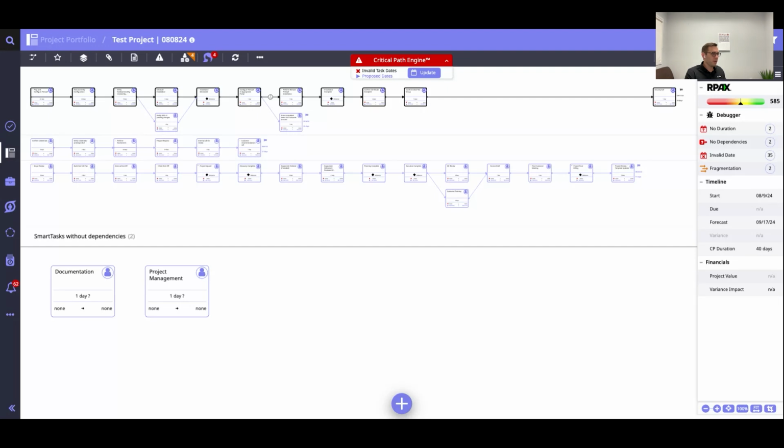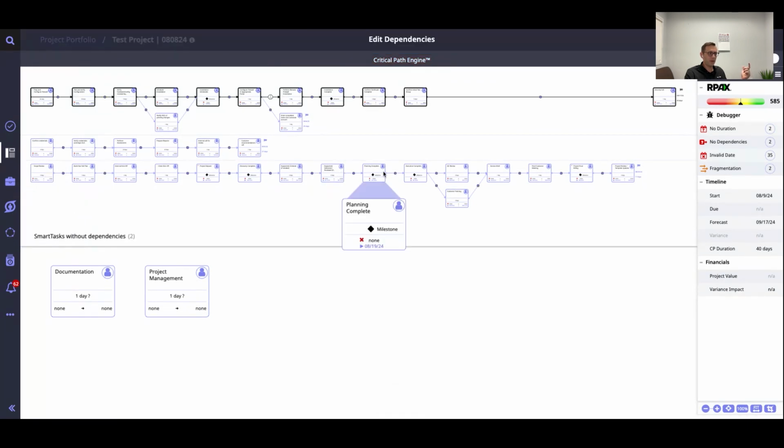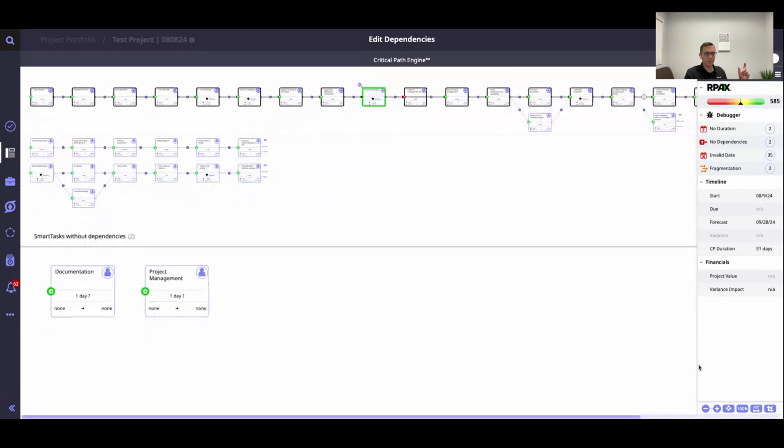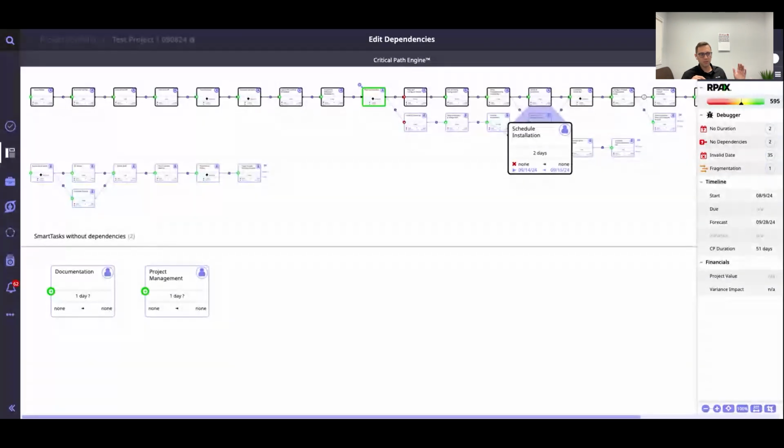What we can see here is, hey, I'm going to start with scope review. We can pull these different pieces together really quickly. From planning, I'm then going to go into those different execution pieces I've pulled together, and tie these all in so I can have multiple work streams happening at one time. What Moovila will do is whatever is going to be on the critical path, the shortest length from start to finish on that project, we're going to put at the top, right? Those alternate work streams are going to run at the bottom. But as some of these tasks at the bottom become the critical path, we'll flip all this for you.